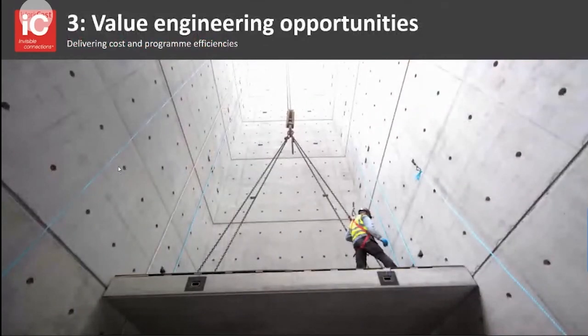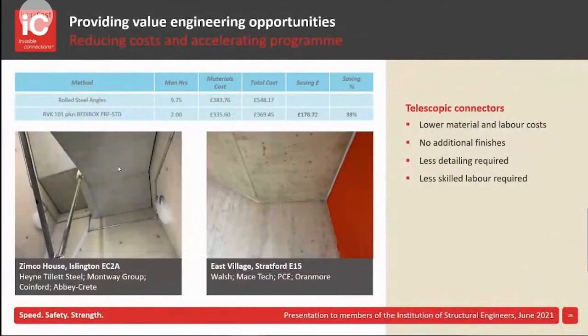When it comes to value engineering and reducing costs and accelerating programme, sometimes people think that because the technology is relatively new it's going to be prohibitively expensive. But we've done a peer-reviewed costing analysis comparing installing landings using rolled steel angles versus telescopic connectors, and taking into account time and cost of materials, we found a 33% saving in labour and materials. This was done a couple of years ago, and as Steve mentioned, two connectors is less than half the weight of steel of an angle — and with steel prices having rocketed, that saving is going to be even greater now.